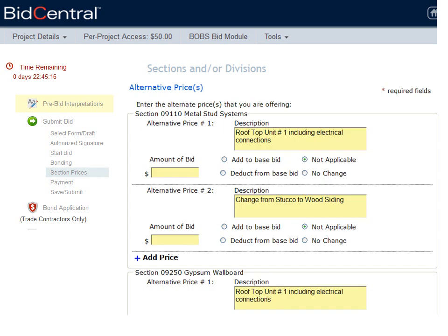Once you've completed what you're bidding, a window will open with the list of alternative, separate, or unit prices that applies to each of your price combinations. Note that alternative, separate, or unit prices will not appear on the online bid form until such time as you have put a price amount in on your draft bid form. Prior to the bid form being available, you can see these price requirements on the preview bid form. This window will only provide pricing for those items that have been included on the bid form by the administrator.